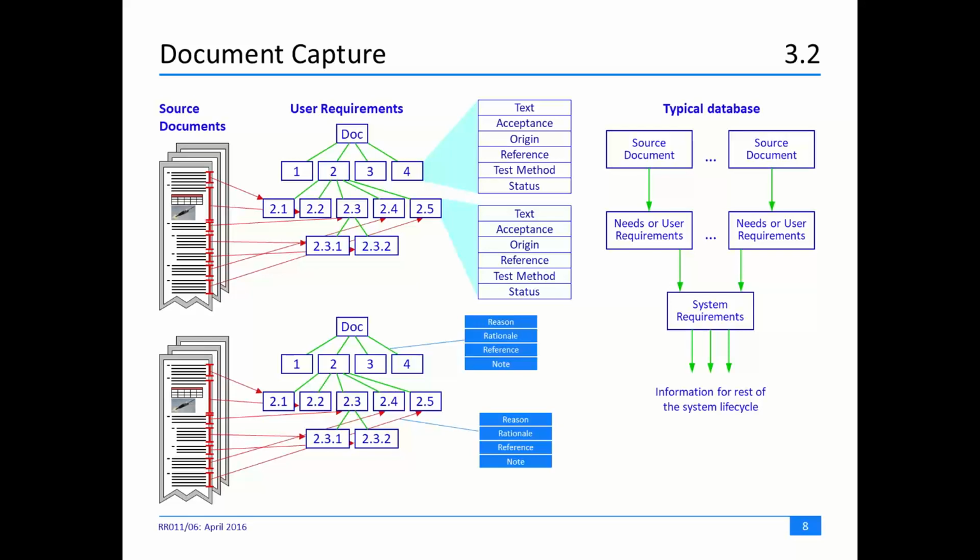So we bring in a new version of a source document that updates information in the database and marks everything downstream as being, in Cradle jargon, suspect as potentially requiring change, which then prompts you to act upon those source document differences and reflect them in the rest of the information in the database, or indeed, of course, having taken stock as to the scope of those downstream effects, to potentially reject that new version of the document and go back to its author to renegotiate.